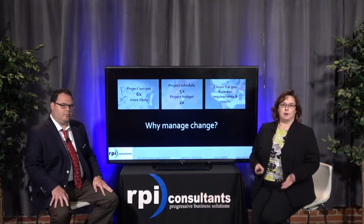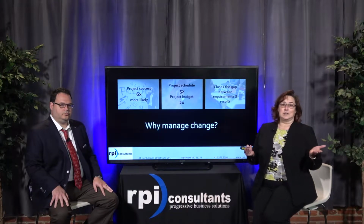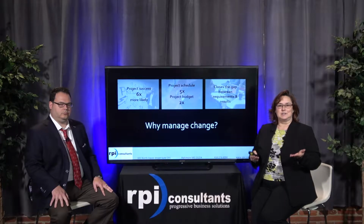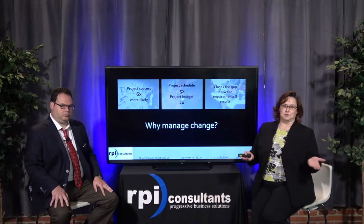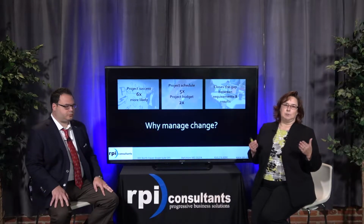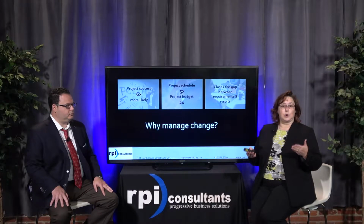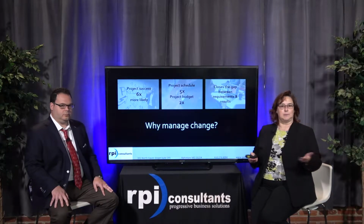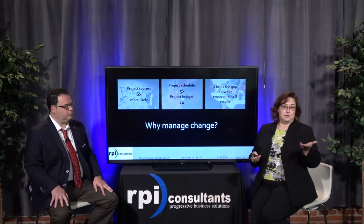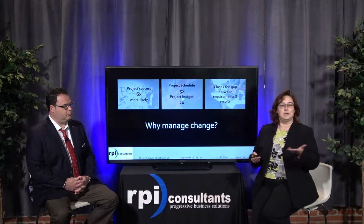Now, why bother? Why bother to manage change in addition to your technical project? You've got a lot going on. Well, the reason is that ProSci, for example, who's one of the leaders in change management, have conducted benchmarking studies since 1998 with literally thousands of change agents, and they have consistently across surveys gotten employee engagement as one of the key reasons for project success. They publish a report called the Best Practices in Change Management, and that can tell you a lot about some of the key points related to change management, why it matters. But basically, it makes your project about 6 times more likely to be successful if you use change management in it. And it increases your ROI.